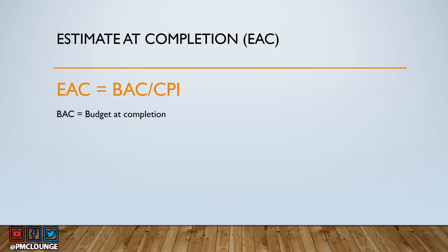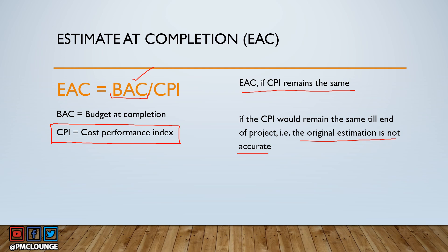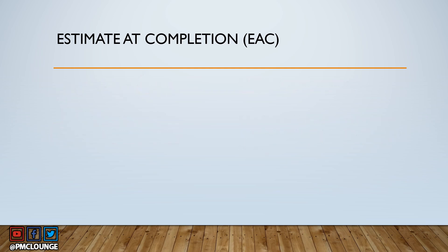Another EAC formula: EAC equals BAC divided by CPI, where BAC is Budget at Completion and CPI is the Cost Performance Index. Use this formula if the CPI remains the same through the end of the project — meaning the original estimation was not accurate and cost performance is expected to continue at the same rate.